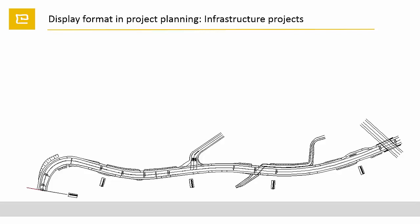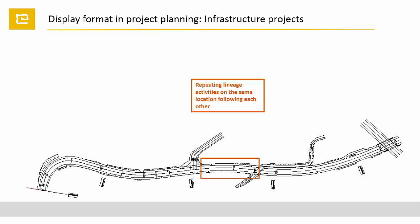Repeating activities on the same location are very common in infrastructure projects. Different layers of work are following each other, often with different speeds. For building these road segments, we have to cut the earth, compact the ground, then lay the base and binder cores. Each activity is quite different, uses different equipment, and is working in different speed.